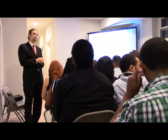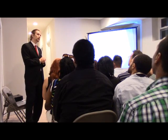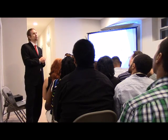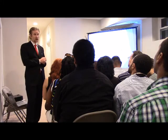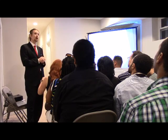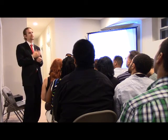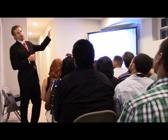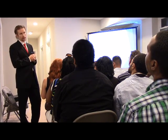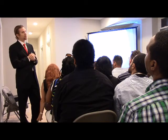What would you say the cost per square foot was to build this? So if you were to hire a builder, you probably would have paid anywhere between $130 to $135. We did it in-house. It'll probably be a little over $100 a square foot. But that's not including certain costs that we have. For example, we have all those subs, but we've got to have somebody in here keeping the job site clean and that sort of thing too. So you have a lot of costs above that as well. All said and done, maybe $110 to $120.